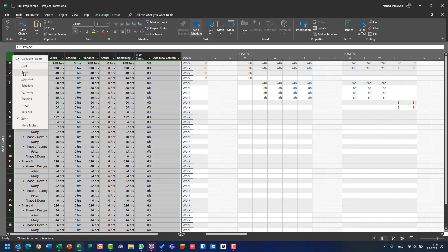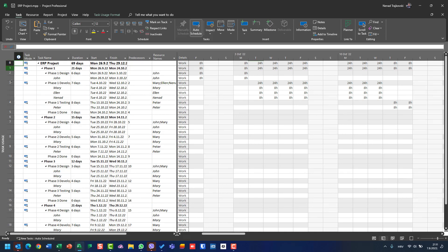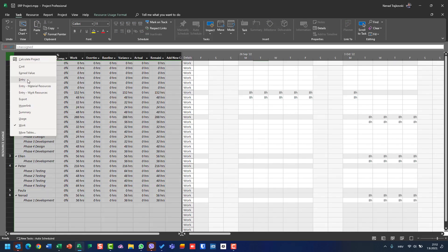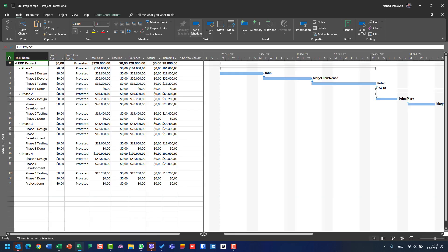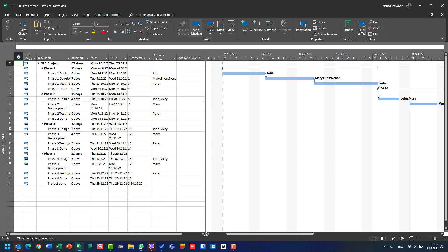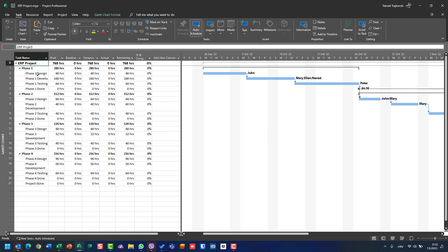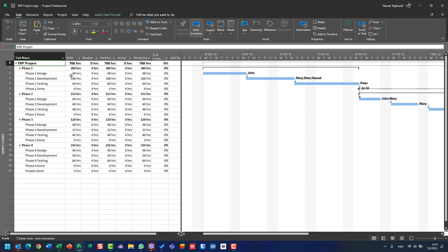Let me explain something here. I'll go to Task Usage view, then Resource Usage view and apply Entry, then Gantt Chart and apply Entry. Be aware: when you change a table — let's say I want to see Work in a Gantt Chart view — I choose Work, and I see for Phase 1 design 48 hours, Phase 1 Development 168 hours, testing 64 hours, milestone zero hours, etc. I don't see any resource here.